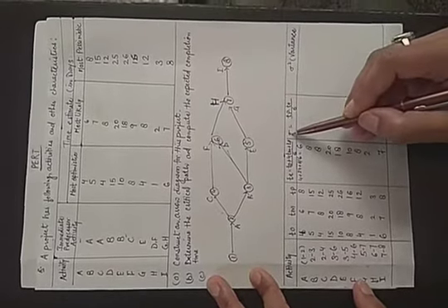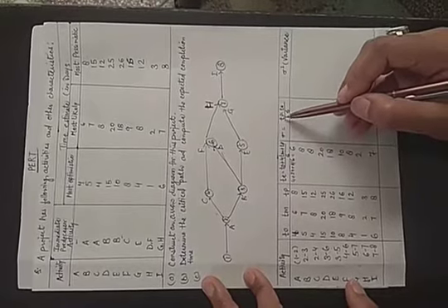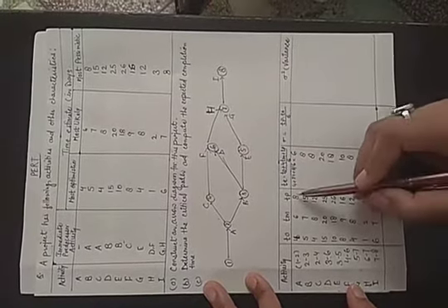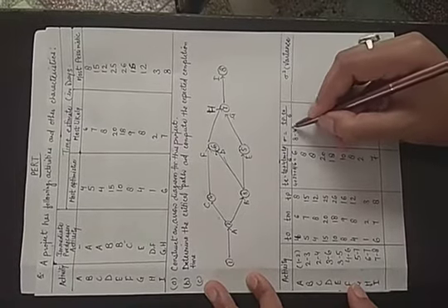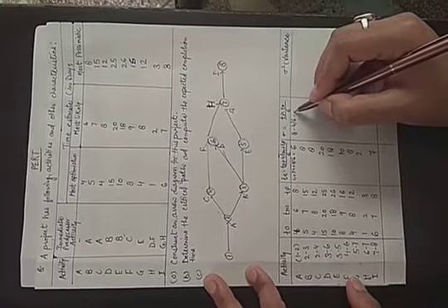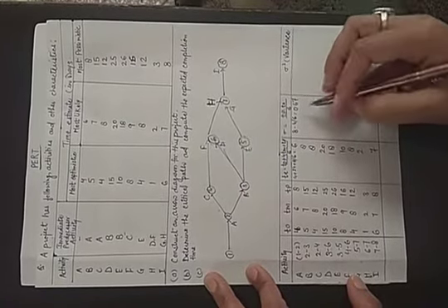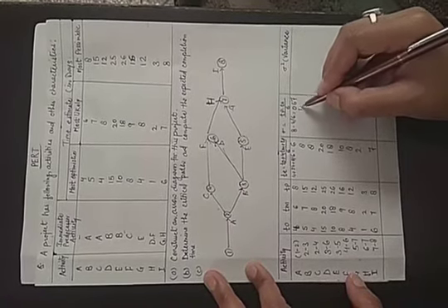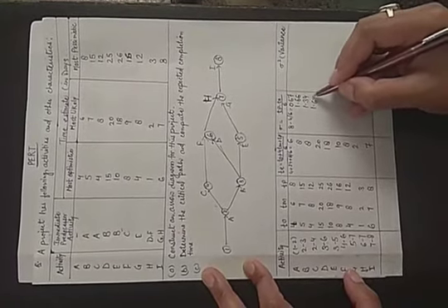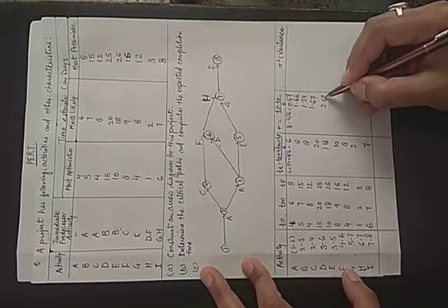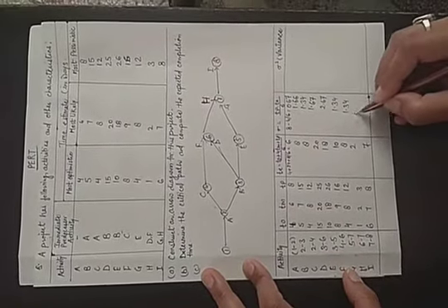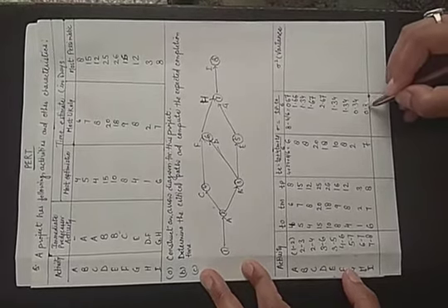Now we will find the standard deviation sigma by the formula: pessimistic time minus optimistic time divided by 6. TP minus TO upon 6, that is 8 minus 4 upon 6, which equals 4 upon 6, that is 0.67. Similarly, we will calculate the rest and they will be as follows: 1.66, 1.34, 1.67, 2.67, 1.34, 1.34, 0.34, 0.34.